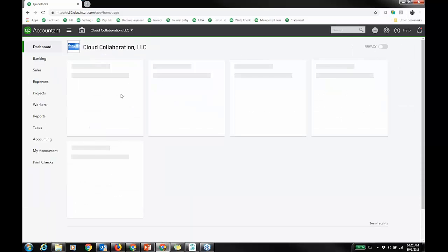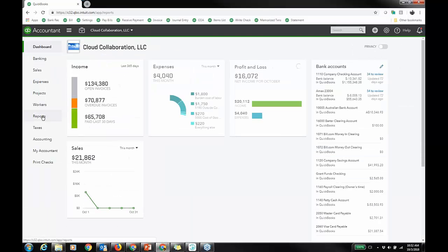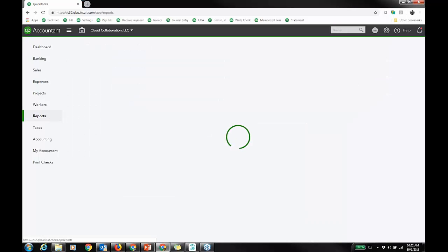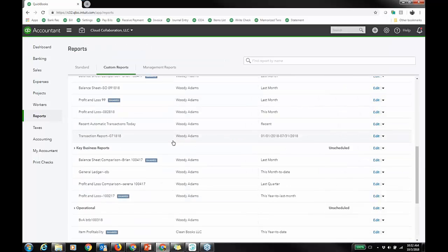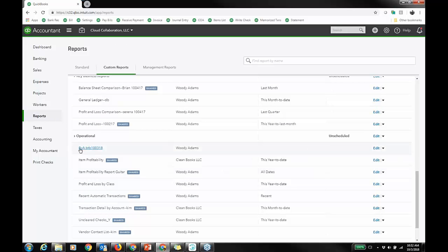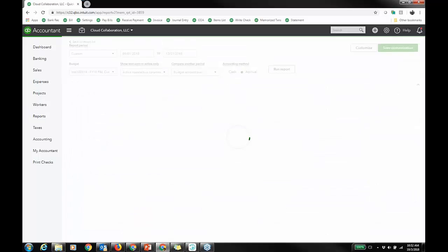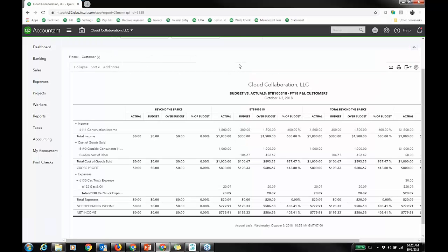Now, related reporting. Let's see how we're doing. I'm going to go to the budget to actual first. This is my estimate to actual report for this project. So now I'm over budget, under on a little, percent of budget. Yeah, I get some crazy numbers there. I haven't incurred all the costs. I think we've only done like 3 or 4 hours of the 48 hours, so that's probably why. It'll come down. But at least I can see my progress if I've done that.